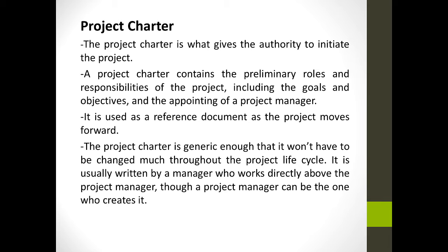Project charter. The project charter is what gives the authority to initiate the project. A project charter contains the preliminary roles and responsibilities of the project, including the goals and objectives and the appointing of the project manager. In the project charter, each and every person's roles and responsibilities are mentioned. It is used as a reference document as the project moves forward. We can take a reference of this project charter for your next project.